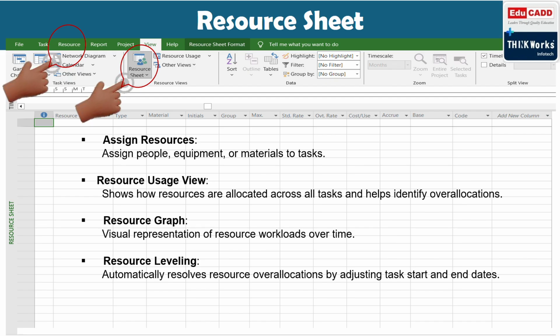This is also one of the important aspects in any project, because based on your schedule, the resources will come randomly. If I take the labor example, when you prepare a schedule and add the resources, it may show one day 50 people, another day 100 people, another day 200 people, another day again 60 people, like that.